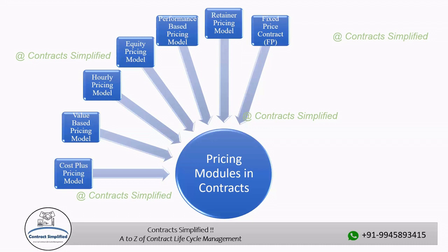In this, the buyer agrees to pay a fixed price to the seller for the completion of a specified scope of work, goods, or services. This type of contract places the majority of the risk and responsibility on the seller.